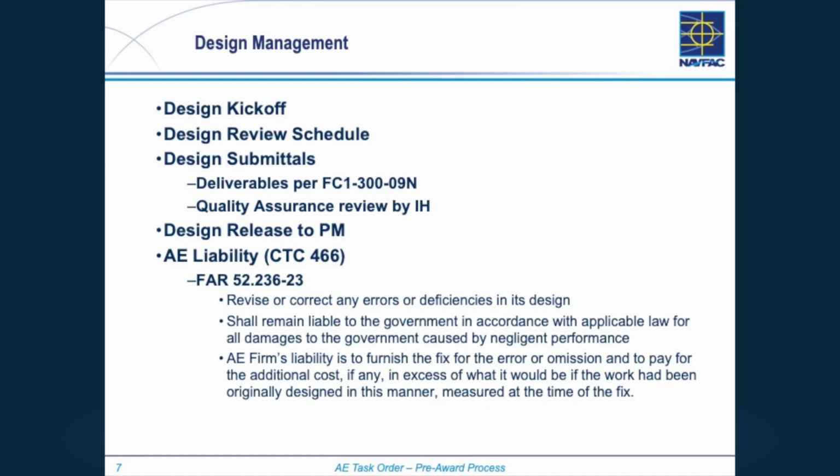We're now fleshing out the schedule, and you're making sure your PM has the dates that we're going to get delivery of things. If it's a full design bid build, 35, 65, 95, those dates go into e-projects, and they're updating that schedule. So that then the solicitation schedule that comes beyond that is based on when you're really going to get your design deliveries. And your AE is the one that's buying into that.